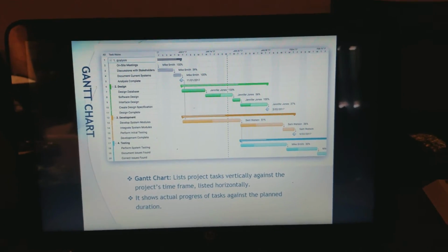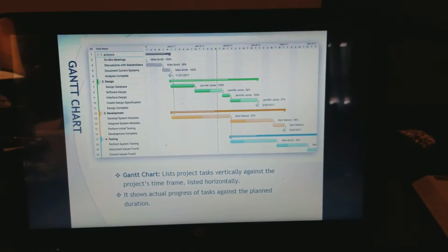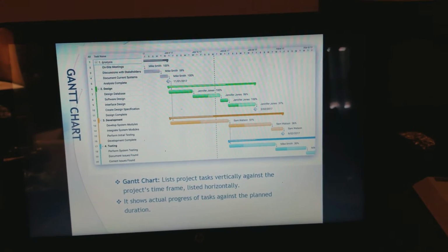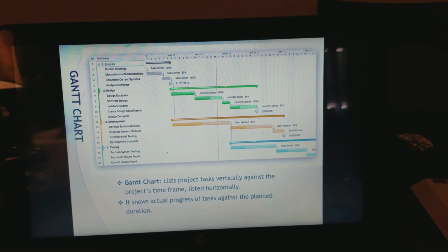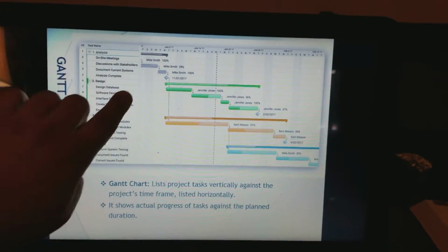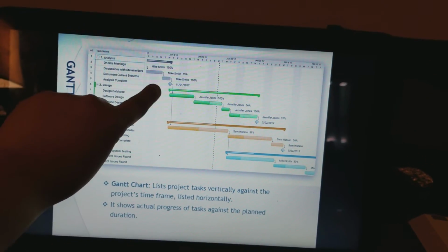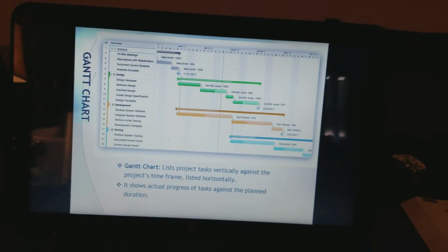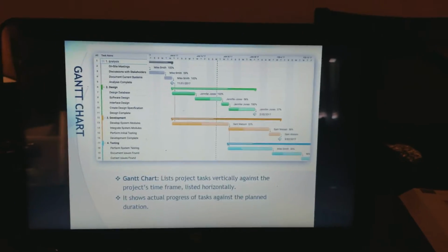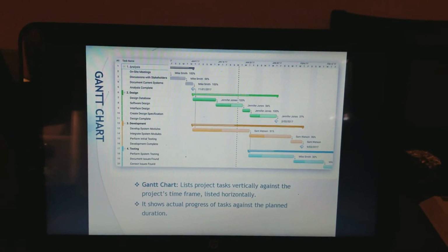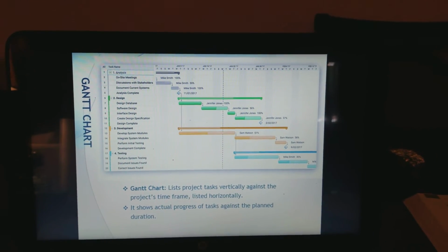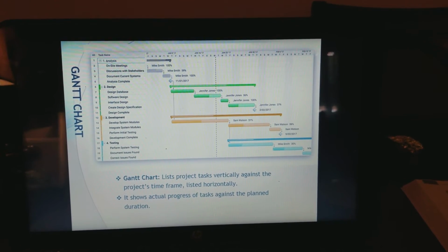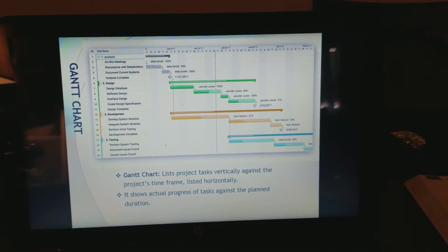The milestones, which are the diamonds, do not have a duration. A milestone marks the end of a piece of work. So basically, those are the times the work took, and once it comes to an end point, it will be marked with the symbol of the diamond. Each of those diamonds, you have to label with a date, which will be very important.